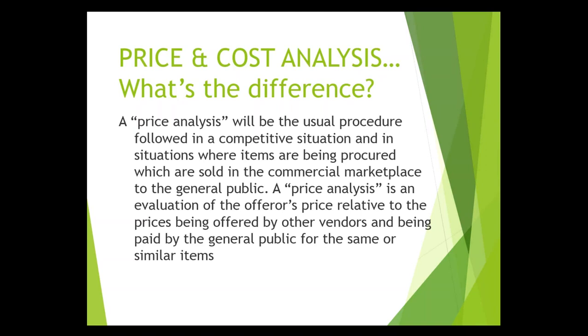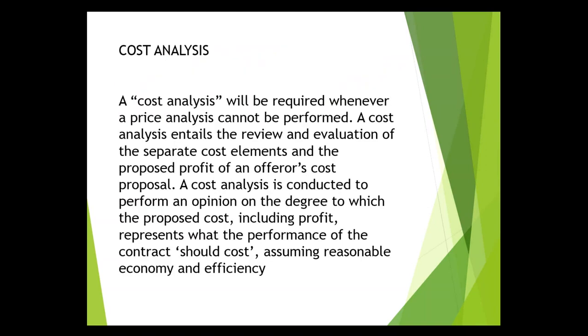A cost analysis is different. It's required when a price analysis cannot be performed. Cost analysis really is very difficult and can be very expensive. It's used when bids and proposals come in way outside the price range that you've determined by the independent cost estimate. And performing a thorough independent cost estimate prior to engaging in a procurement can help to avoid being in a cost analysis situation.